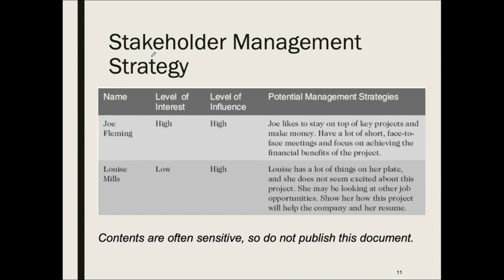This is also another document that's created after identifying the stakeholders. We need to have what we call the project stakeholder management strategy. You decide on the strategy of how you're going to manage your stakeholders. This is an example here. But this document is very sensitive because you are going to talk about people, about their behavior, about their personality. So this should not go out. It has to be with the project manager only.